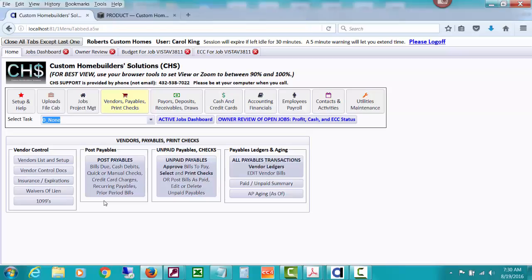It will alert you about overages. If you select from doing purchase orders, which you don't have to use but are a very powerful tool, then that bookkeeper can quickly get that bill entered, will get alerts, and can write notes right away to the project managers or builder about overages, and upload and attach a copy of the bill so that project managers can get on here and look at the list of bills just for their jobs.